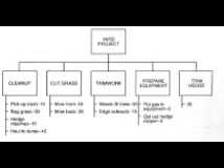So obviously the cutting of the grass would take 75 minutes. The trim work, to trim the corners of the lawn that the lawnmower may not be able to get to, trim those areas, you need 45 minutes.